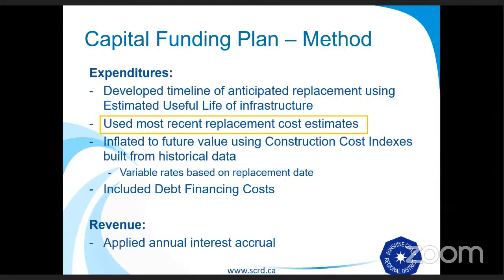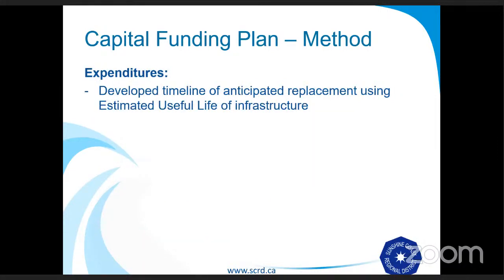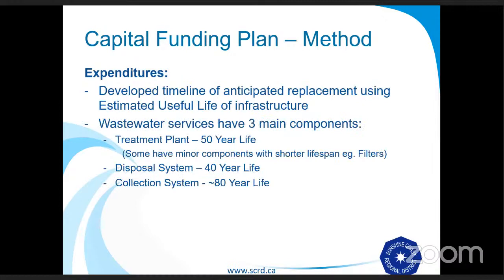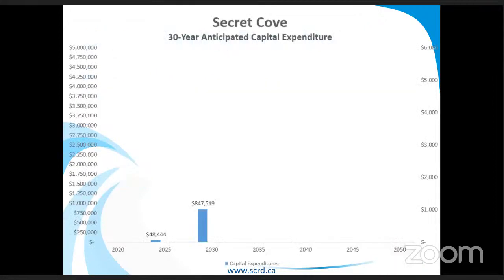In order to reduce the effect of inflationary values, we've used the most recent replacement cost estimates. So if we have a system we've recently replaced that is similar in size, we would use that construction cost estimate to give us a more accurate idea. These are all still just estimates, though. When we talk about useful life of the infrastructure, there are three main components in your wastewater service with quite long lifespans: 50 years for a treatment plant, 40 years for a disposal system, and 80 years for the collection system. If our window of study is too small, we're not going to pick up certain components and won't plan to have enough finances to replace them. So we looked at three different windows when constructing these models. The first is a 30-year window, which is what you see on your screen now.